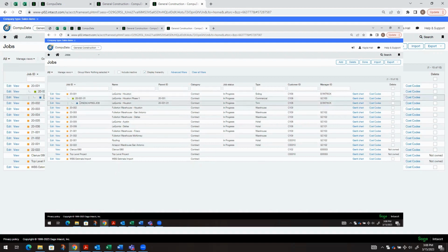Another thing to mention is there's no limit or requirement for project IDs. I believe this is a 40-character field. It can be alphanumeric or numeric. We can create a document sequence if you don't want your users populating the project IDs. We can also use what are called smart rules to create restrictions. So for example, if we want to keep them 6 characters for top level projects, then we can do that. We can create those filters.